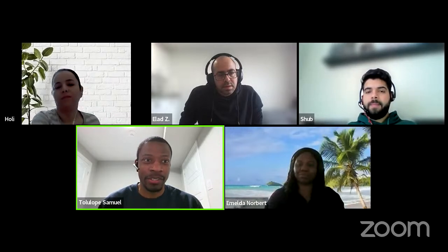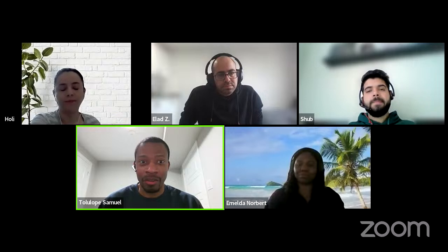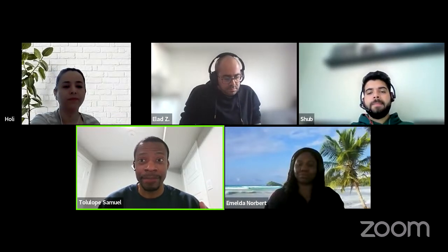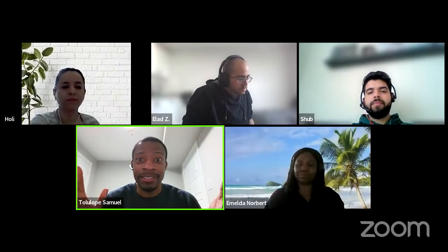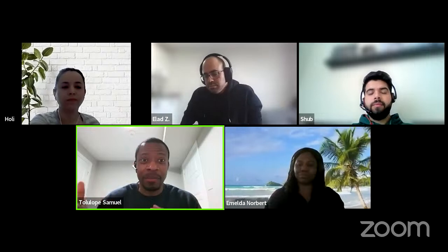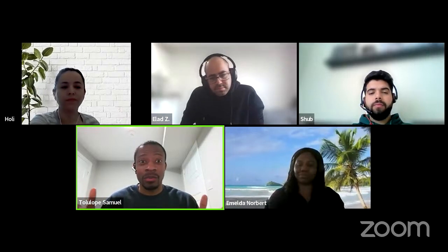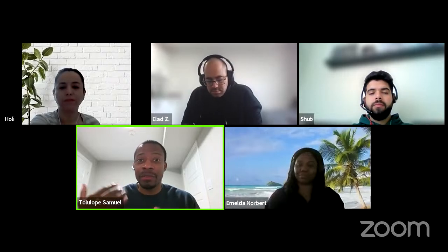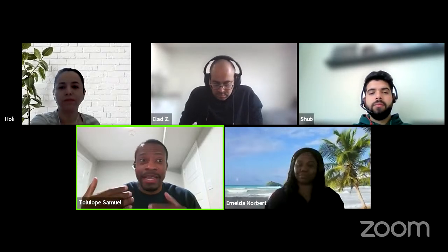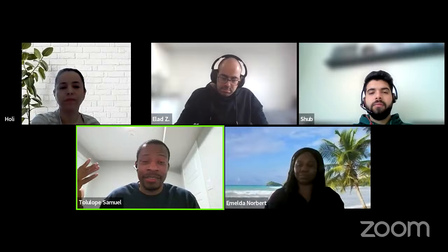But yes, to your point, that kind of conversation is a scope conversation, right? And sometimes, genuinely, it's possible that nobody thought about it. You know what I mean? So it's the first time it's come up, and we're like, oh, wait a second. Is this actually going to be in scope or not? And then you have to take it back. Sometimes even the business folks don't know. They have to take it back to the senior executives, and then they would make the decision.